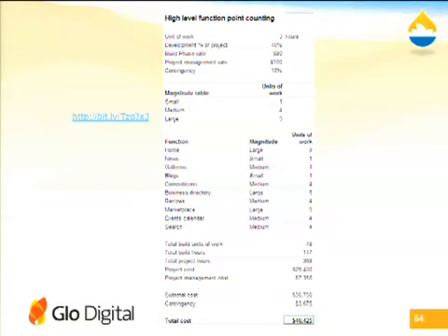A little bit on this topic. Do you even give them the contingency and project management figures? Do you usually try to hide it? No, I don't try to hide it. No, I tell them what my contingency is. As long as they don't say, when you're actually in the project and you use up some of the contingency, there's a bit of contingency left. Can we use that for something else, please? You make it clear right up front. This contingency goes into our calculations. What we're charging you is a fixed price bottom line. That's what's in the contract. Yeah, you've got to be clear. One of my tips before was make sure they understand your contract. Yeah. Okay, moving right along because we have to have some questions and finish.